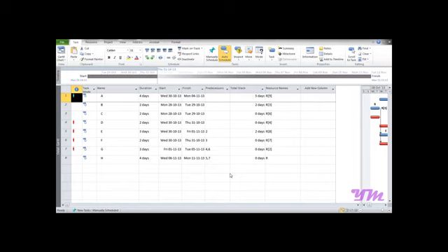Resource leveling in project management is a technique used to examine unbalanced use of resources over time and for resolving over allocation or conflict of resources. So basically in this file, after you assign the resources, you can see that there are small red marked symbols over here. This indicates that the resources required for the task are more than that we have assigned.